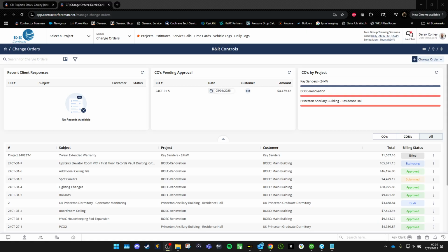It's important to use change orders when modifying a project because it can help make sure all parties agree about what those changes entail and the associated change in cost and potential time delays. We create a change order anytime there is a change in scope, a monetary hit that has to be absorbed by someone, or a time delay that will extend the project out past the set date of substantial completion, whether it may be by request or an accident.